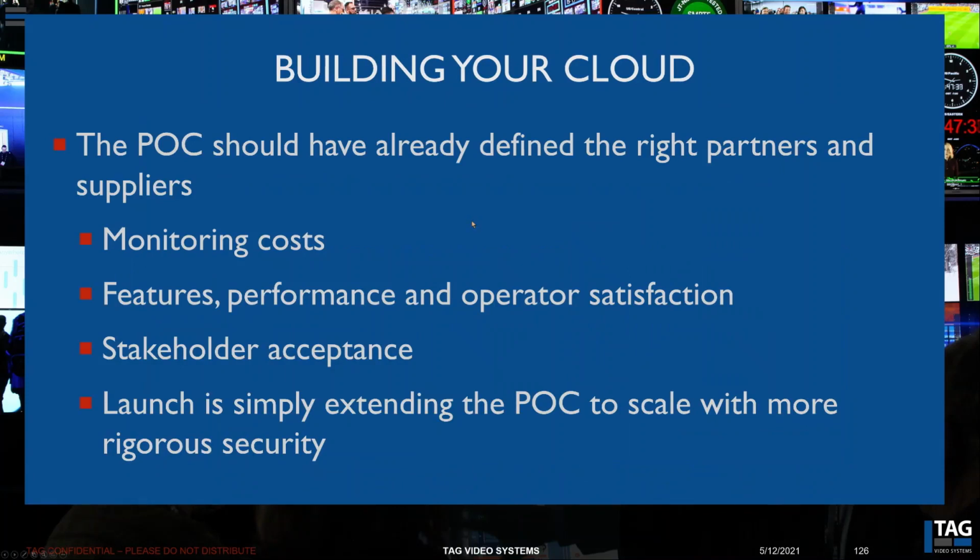So then once you've done that and you figured out which is the right vendor, you build your cloud. The POC should have already defined the right partners and suppliers. So really at this point, you've been monitoring these costs, and you've got features and performance and operator satisfaction and stakeholder acceptance. So now building your cloud is really a matter of turning off the other systems and scaling up the one you want and tightening down the security and making sure the right accesses are in place and it is built to actually be operational.